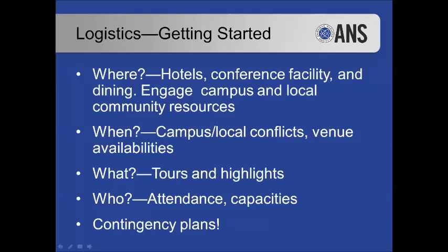Other timing concerns you want to think about are any sort of local festivals that you have going on. For example, in Madison, there was a very large dairy expo that happens every year that pretty much took over the hotels that we would be thinking about, so that was something we had to plan around.